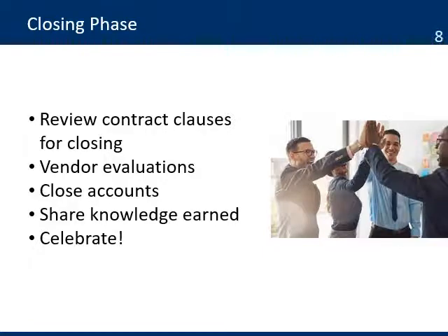Here are some recommendations for this phase. Review contract clauses for closing. Make sure you review all the contract requirements, especially from the donor. Make sure you have an understanding of what to do with any asset or leftover inventory that was purchased with donors' funds. Different donors will have different approaches on what to do with those assets.